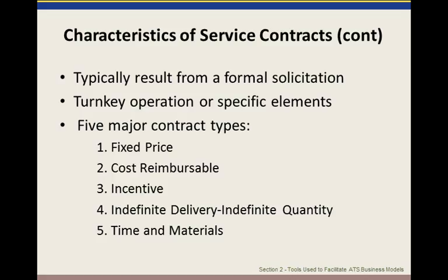There are 5 major service contract types. I won't describe all of them here, but of those that we reviewed, primarily they were fixed price contracts whereby the FLMA agrees to pay the contractor, the service contractor, based on service hours. But many of them also had some opportunities to contract or expand service by a certain percentage. For example, the service contractor provided X number of hours per day or per year, but if the FLMA decided it needed a little bit more, the contract allowed for a 10% increase in service levels, whereby the contractor would be reimbursed for that additional service.